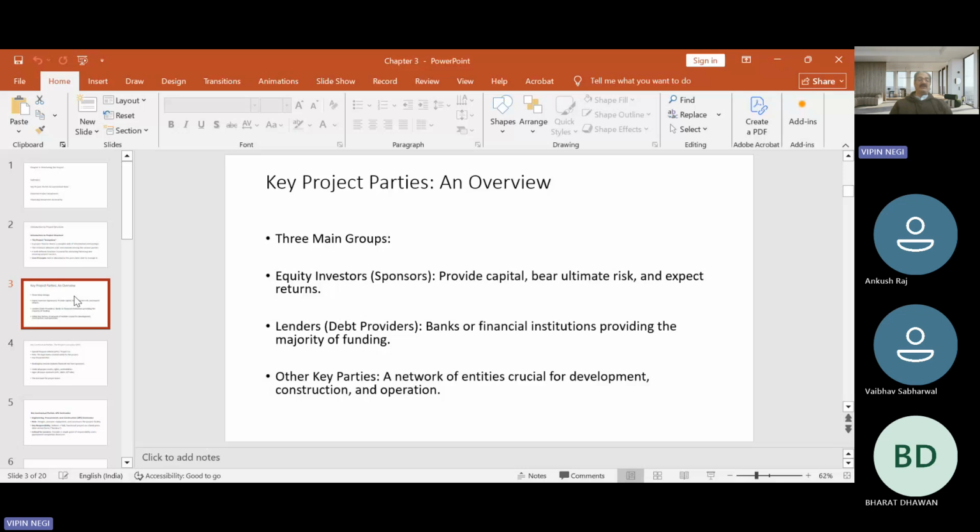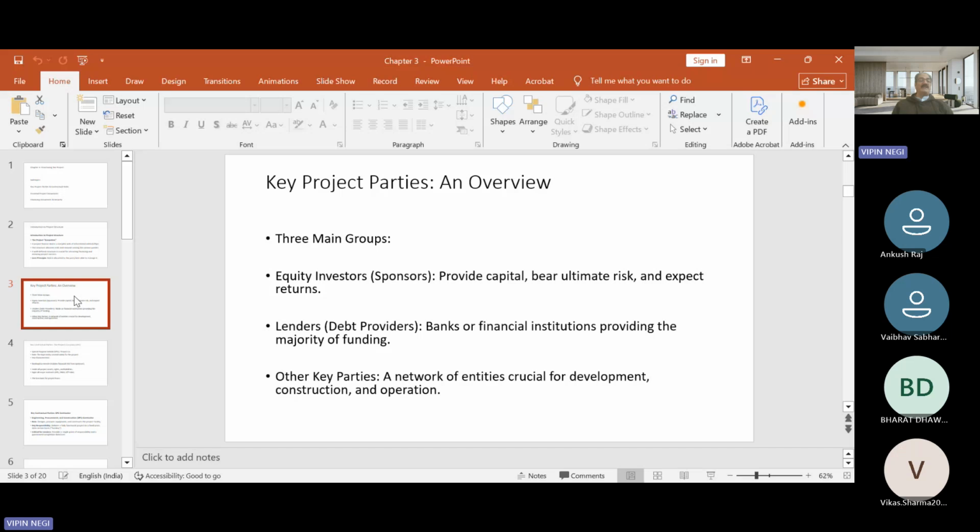Equity sponsors or the project sponsors means promoters or developers who normally belong to established business groups in these financing markets, and they are responsible for converting a concept into a project. So they realize the project basically and conceptualize it. They have a role in setting up a project vehicle, which we call SPV, and then identifying and recruiting the right managerial talent to implement and run the project, providing a clear mandate to such a management on their own objectives or on their own expectations. And they also finally subscribe to a portion of equity in the project vehicle.